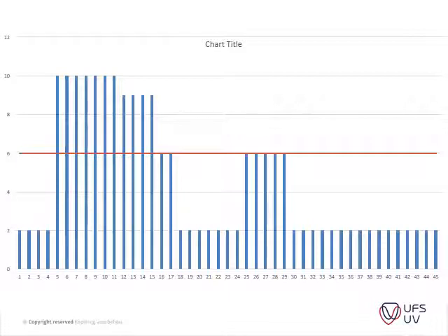This is shown in figure 18.3. Here's the line that I just drew in. He only has 6 laborers available, so obviously he has to make a plan during these peak sessions to level his resources.